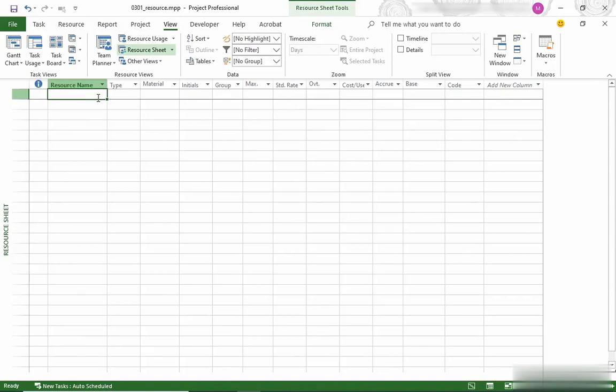We're going to start with work resources. These are resources you assign by time, like the people you assign by the hour or day, and equipment you rent for a week. As far as naming these resources, you have two options. You can fill in people's names, or you can use generic skills. In this example, I'm going to use skills. You can always replace them with the people later.